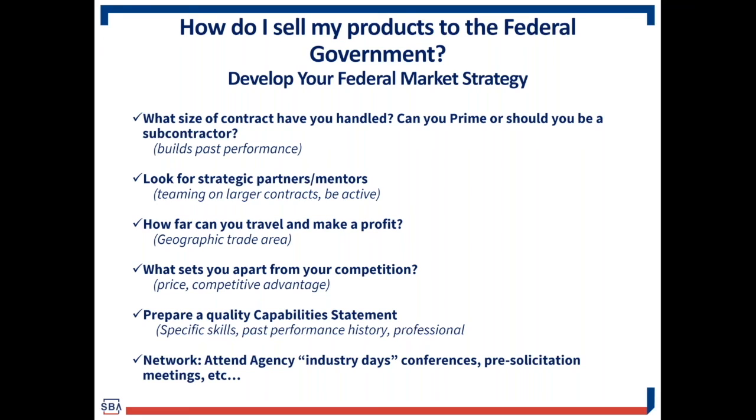So depending on the contract, you need to understand what those payment terms are. You may not be paid until your first deliverable, which could be 60, 90 days out. So you need to think about cash flow and how you manage your business in terms of when you may get paid on that contract. And keep in mind, all of this is laid out in your contract. So you're never going to go into it blind. You're going to know prior to ever signing your notice to proceed what those terms are.